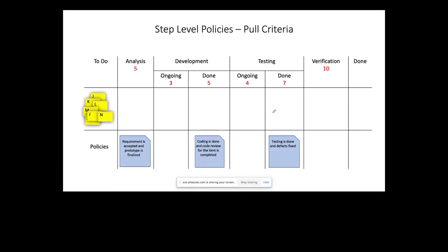Okay. So basically what we are doing is we are adding policies for workflow statuses now, right? We are adding definition of done criteria for applicable workflow statuses. So basically what we are saying is, when this criteria is satisfied, we can move a ticket from analysis to the development in progress state, or basically the developers can take up work from analysis when this criteria is met, right?